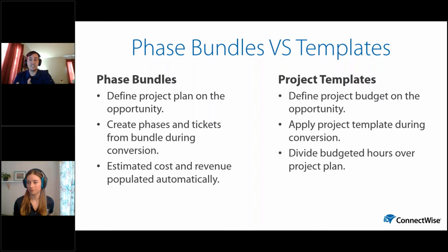If you plan on using project templates, you still need to quote for the labor. That still needs to happen. That's where that lump sum of labor comes into play I was talking about earlier. And we'll define that budget on the opportunity. Then during the conversion process, we can apply the project template so we get the proposed work plan applied automatically, not as part of the opportunity, but further on down the process.